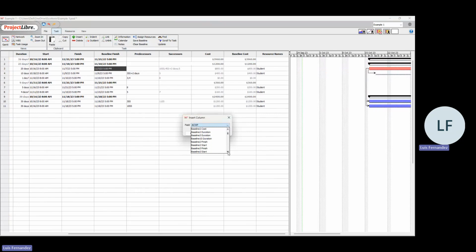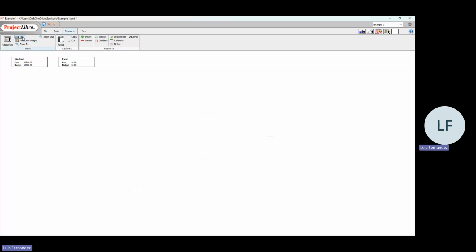As you can see, you have the baseline by number, because you can set different baselines, having these 11 different slots. Now those are empty. Also, you can override it. And if we go to our work breakdown, to the resource breakdown structure, well, now the cost and the budget is the same because we have set the budget now, by clicking again and saving the baseline.